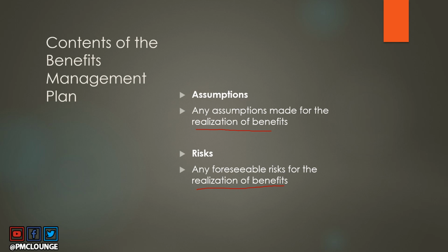The risk is that the travel restrictions do not go away, the situation worsens, and then your project will be successfully completed, but the benefits realization is not going to happen because you won't have tourists coming in to your hotel. So assumptions and risks are also important points that you should note in the benefits management plan document.